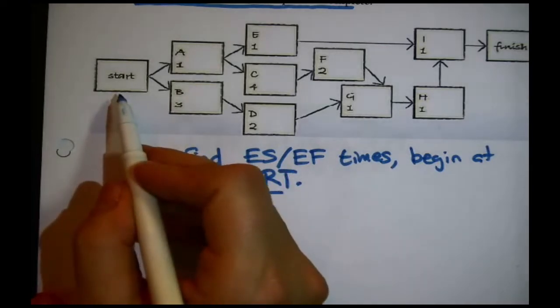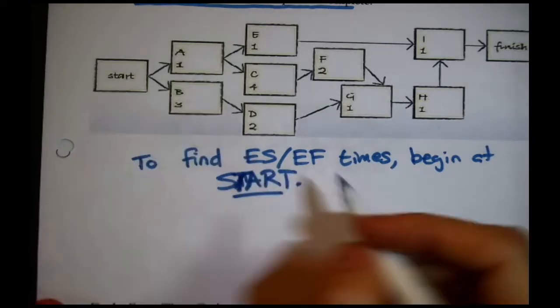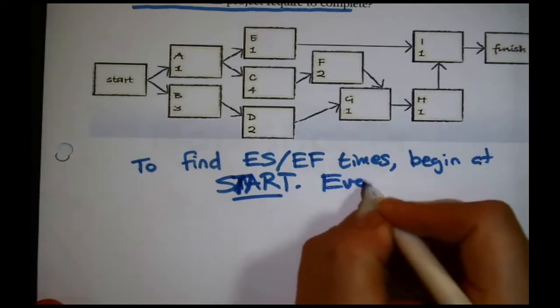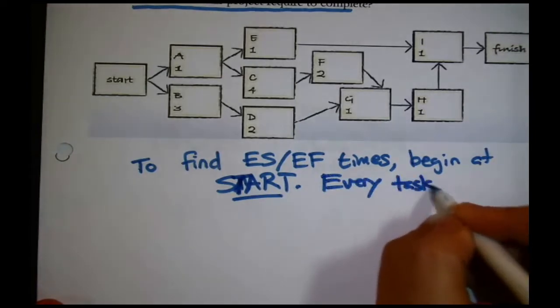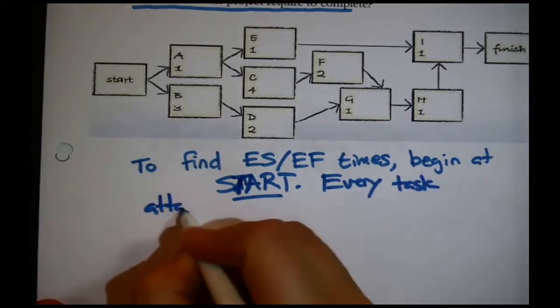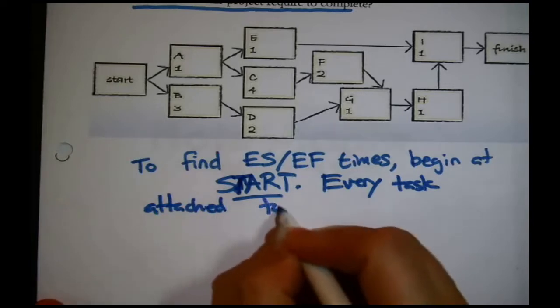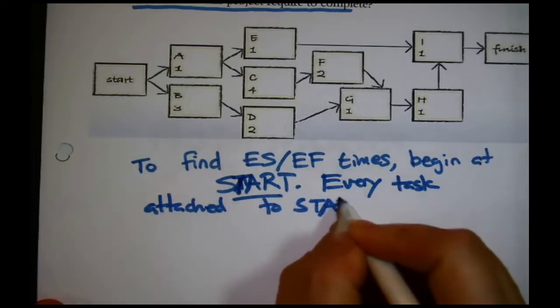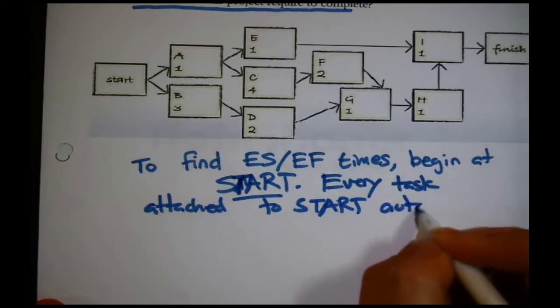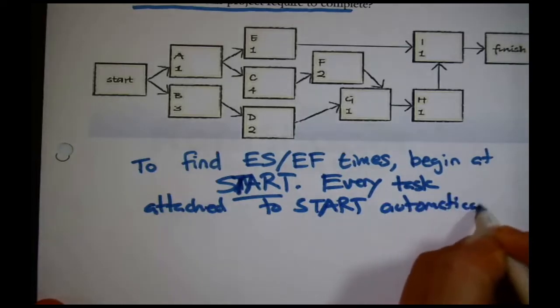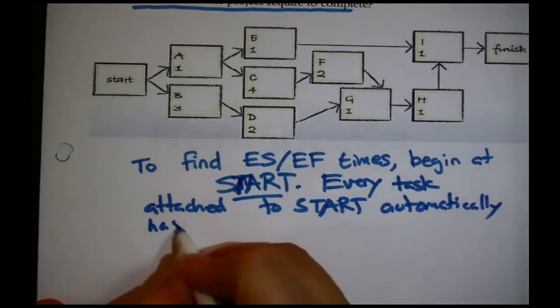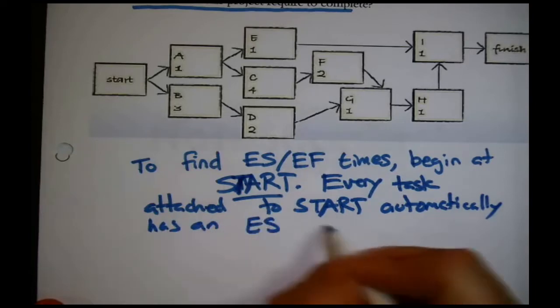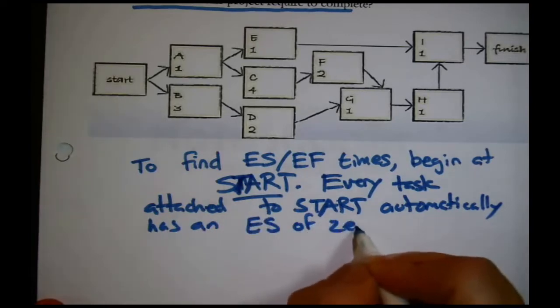You say, okay, why? Every task attached to start automatically has an early start time of 0.